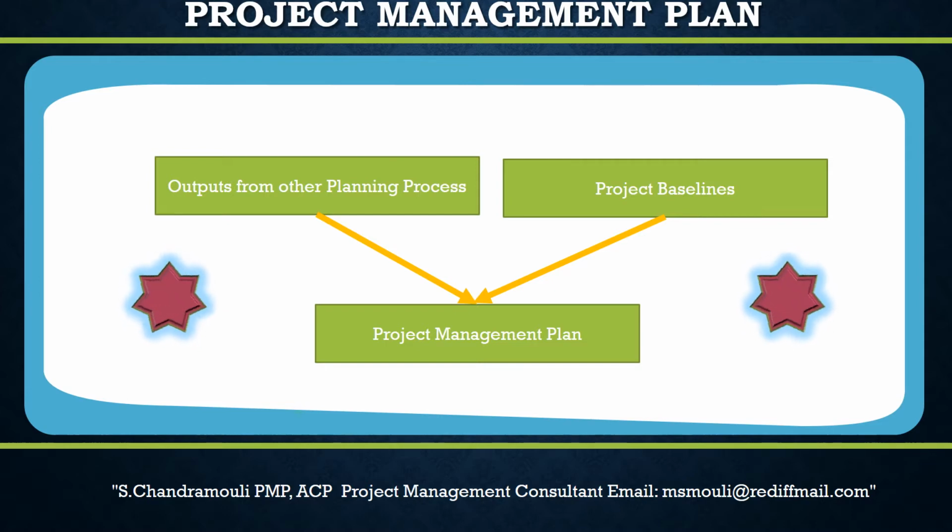Projects that exist in the context of a program or portfolio should develop a project management plan that is consistent with the program or portfolio management plan. For example, if the program management plan indicates all changes exceeding a specified cost need to be reviewed by the Change Control Board, then this process and cost threshold need to be defined in the project management plan.